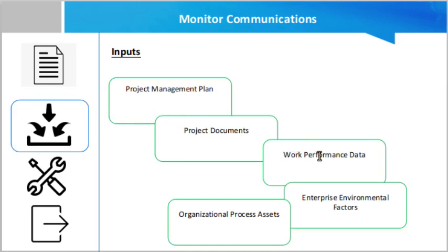Work performance data contains data on the types and quantities of communication that have actually been distributed. Enterprise environmental factors include the organizational culture, political climate, governance framework, communication channels, and global, regional, or local trends. Organizational process assets include corporate policies and procedures, communication requirements, historical information, and stakeholder and communication data from previous projects.